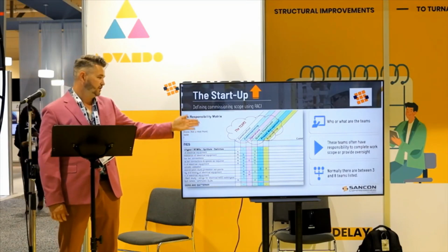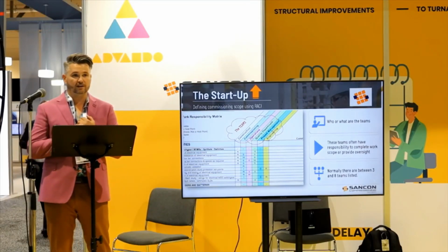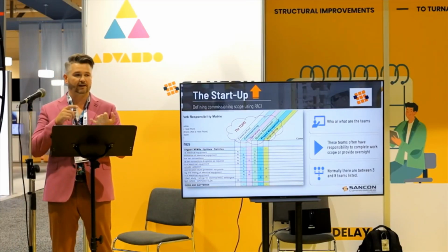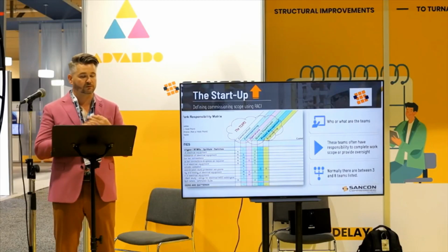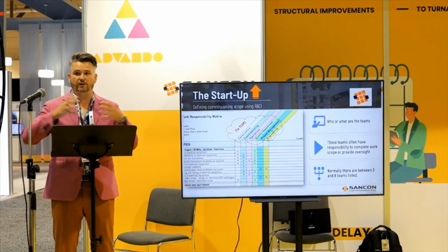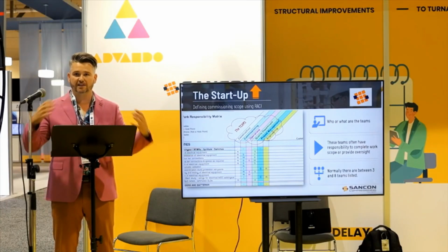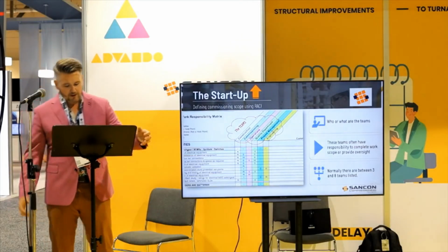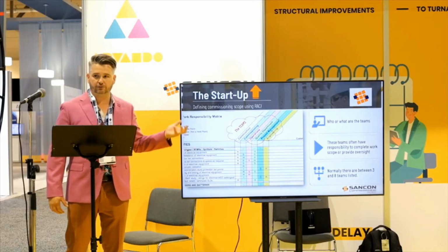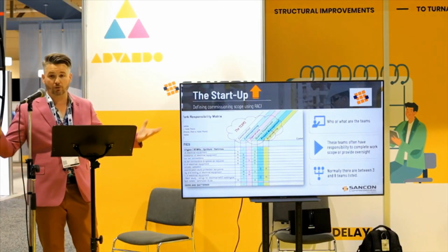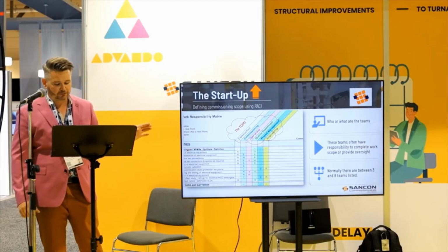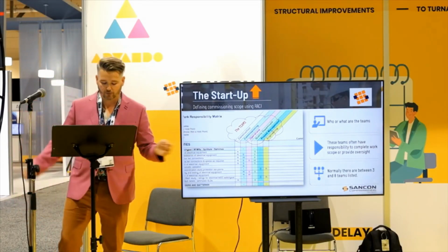We might have multiple commissioning scopes broken out by different commissioning contractors, whether the vendor's doing some of it, the construction contractor is responsible for some pre-com activities. We really don't care who's doing it so much as we don't want to duplicate these tasks and we don't want to miss the tasks. And just for a bit of knowledge, we often see as a minimum 3 teams, and we see them up to 8 or more. So we can keep it as low as we want, with probably a minimum of 3, and then as many as 8 or more.